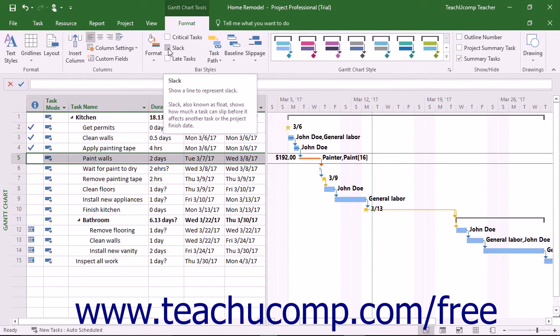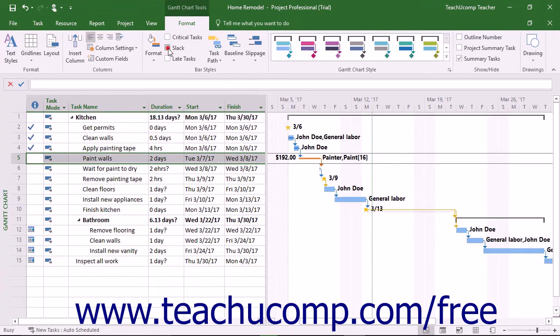Checking the Slack check box draws slack lines in the task bars. A slack line shows how far a task can go past its finish date before it affects the scheduling of another task in the project.